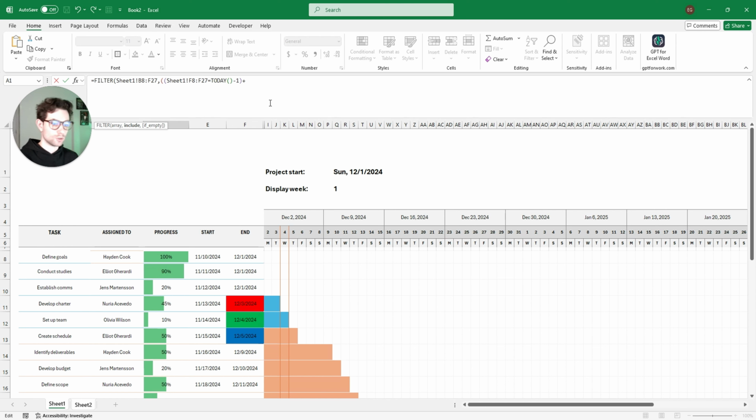So you're probably wondering, why is there a plus sign? We're not summing any numbers. Well, the plus essentially works as an OR function, and then the asterisk works as an AND function. So we want to do a plus because we're doing either past due, due today, or due tomorrow. We're doing either one of those, and then you'll see we'll use the asterisk because they all have to be less than 1. They all have to be less than 100%.